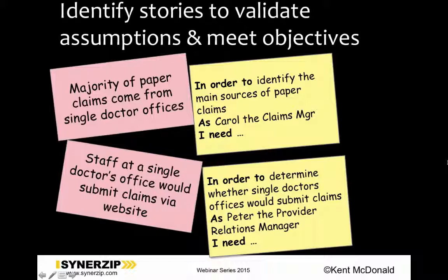So for example here, structured the same way, you'll notice that I twisted the form of a user story around a little bit to put the why part first. This pattern comes from Chris Matz, who said a lot of times if you do the typical "as a some user role, I want to do something so that" the value you're receiving, a lot of times the "so that" falls off. So if you're really concerned about it, it's helpful to put that why part first, in terms of "in order to."